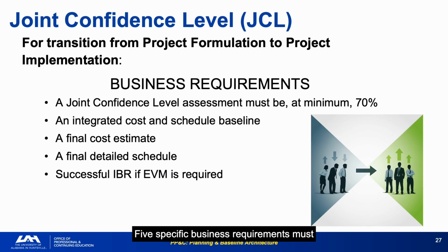5 specific business requirements must be met to transition from formulation to implementation. JCL at 70% plus, an integrated cost and schedule baseline, a final cost estimate, a final detailed schedule, and a successful IBR if EVM is required. My point is, these aren't sequential deliverables. They're interdependent products that must all be in place and consistent before the gate is complete. A JCL built on a schedule that hasn't been validated in the IBR is not a credible JCL.